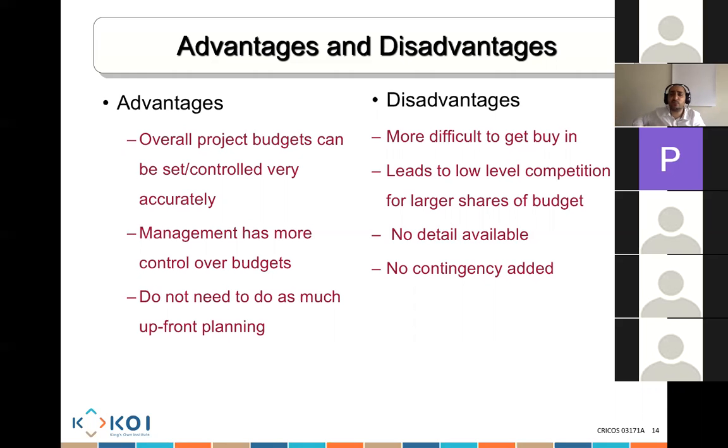Disadvantage is it leads to low-level competition for a larger share of the budget. People start competing. Okay, we want more budget for ourselves. We want more. And basically, departments might start giving different estimations to be able to get more budget.